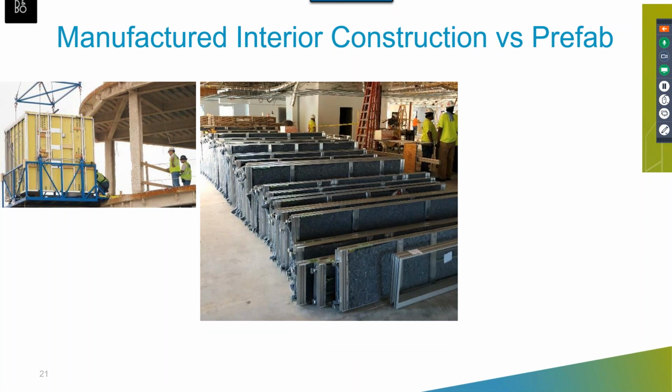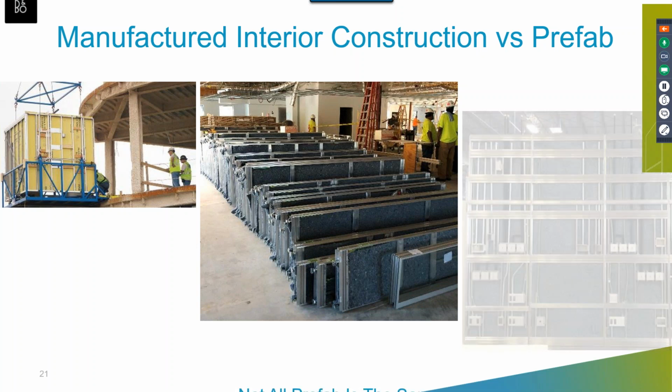Whereas when the material comes to site as an assembly, you have a lot more time to get into the project, particularly if it's a renovation and you haven't gotten into demolition where you might find yourself with some unforeseen conditions. These assemblies can be to site within about 4 weeks. So think about what that allows for your design time. You're really uncovering everything, designing to your solution before you have to hit send on the order entry. And then 3 to 4 weeks later, these assemblies are showing up on site, ready to be installed,